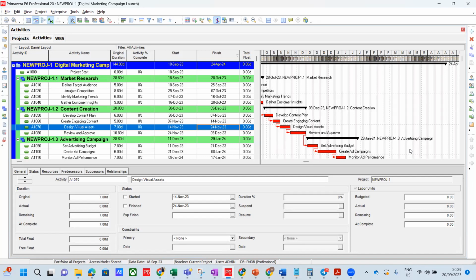They will now put a lag of 5 days in between them. That 5 days will allow the concrete that they've poured to set or cure before they start putting a structure on the foundation which they poured concrete on.